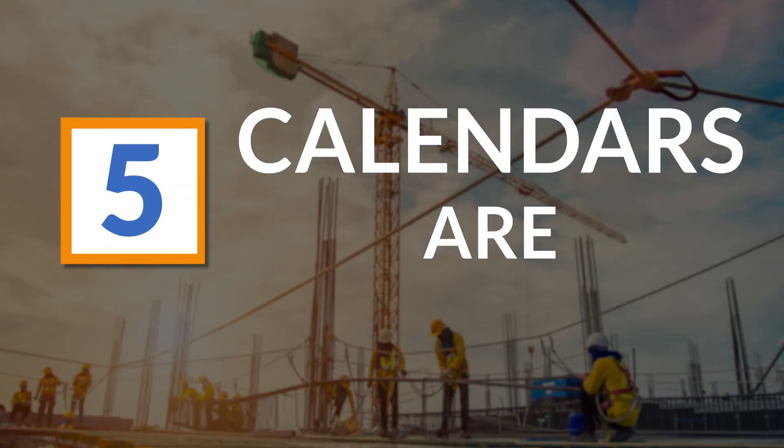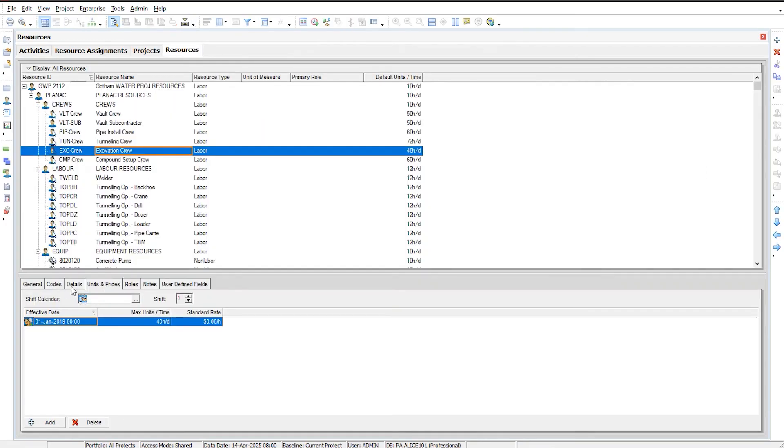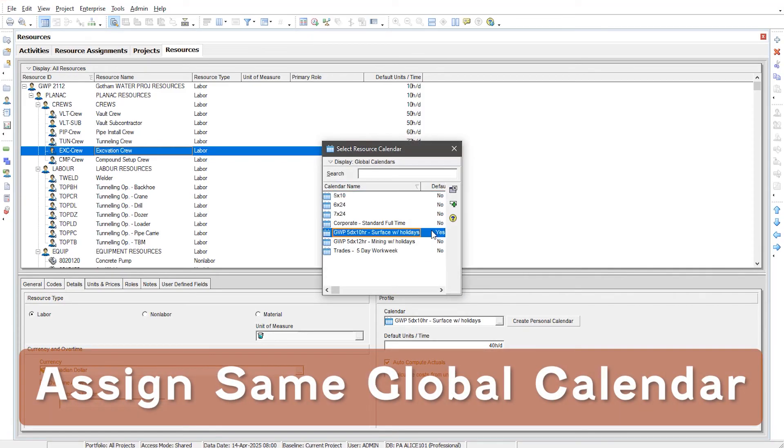Number five: calendars are king in Primavera P6. If you want all this to work, you need to be meticulous with your calendars. Don't use personal or crew calendars. Let's go back to our resource dictionary — on the details tab for any resource, there is a profile area and a calendar that can be assigned. I highly recommend you assign a global calendar — it should be the same global calendar you are using on the project. If you're using a project calendar, copy it to a global calendar and assign it here.